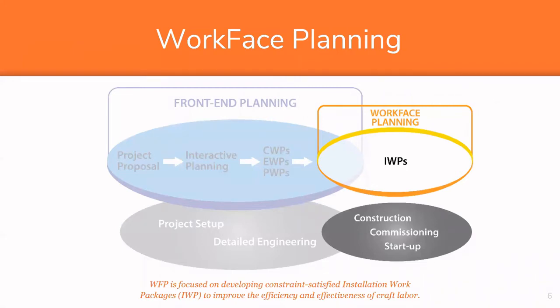So the first thing that we want to talk about is WorkFace planning. There's a definition that WorkFace planning is the process of organizing and delivering all elements necessary before the work is started to enable craftspersons to perform quality work in a safe, effective, and efficient manner. So basically what we're saying is we want the construction crews to have everything they need to be productive on site.